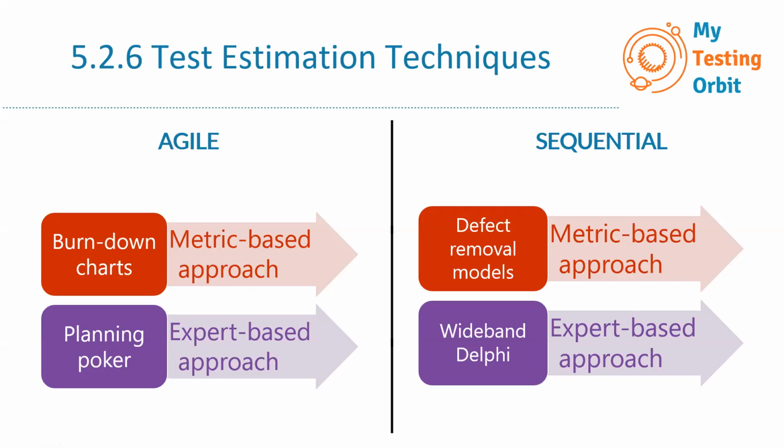So each one has cards and they come up with an estimate, and then let's say there are 5 people and 3 of them have agreed on one size of that user story, then as a majority, that's taken and written down as an estimate for that user story.